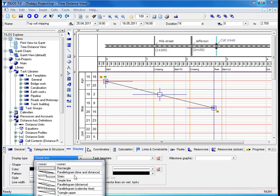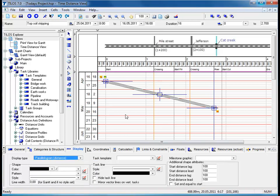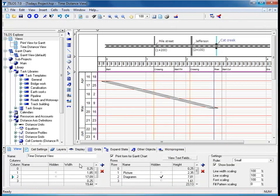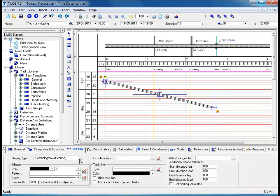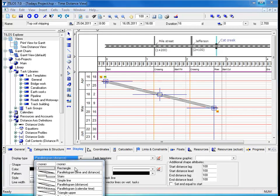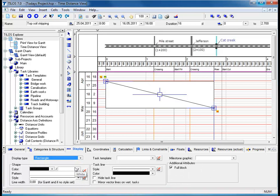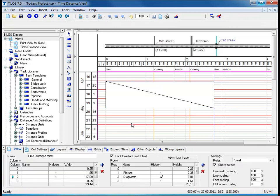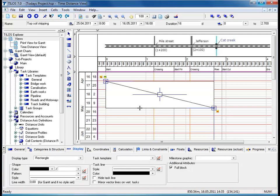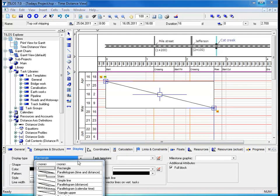A parallelogram, for example, adds a distance lag to the shape it represents in the working area. By highlighting the task again, it will take us back to the display view tab, and we can choose a rectangle. A rectangle indicates the work being carried out in a specific area without the work crew moving beyond its confines - this is usually the case with bridge work or road crossings.